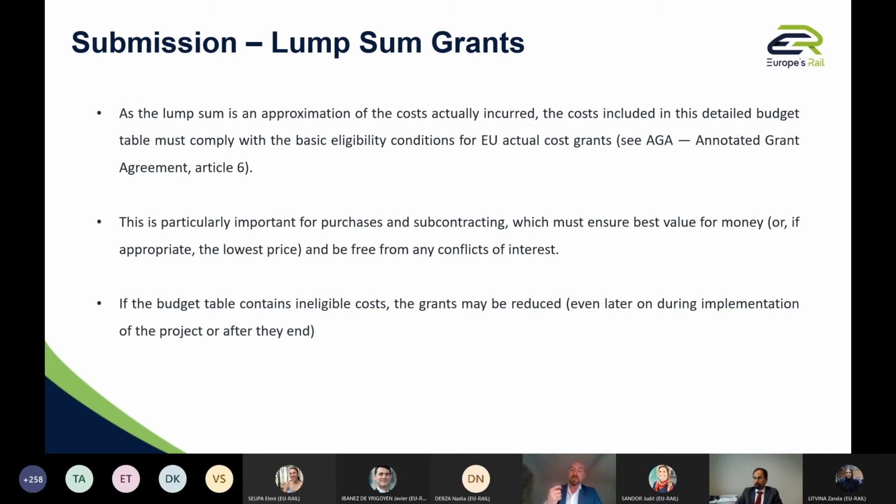So at the definition, at the preparation phase, you need to consider the Horizon Europe eligibility criteria. What kind of subcontracting, for instance, should I use? As mentioned by Valerie earlier, there are some basic conditions to integrate the subcontractors, some rules, you cannot do whatever you want. So you need to take that into consideration when you build the budget of your proposal.